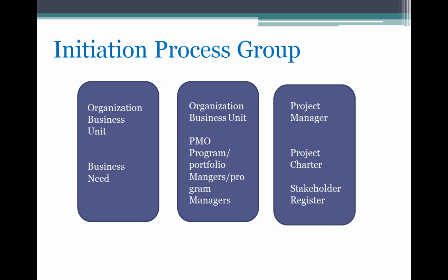They assign a project manager to prepare a project charter for this business case, and the project manager analyzes and goes through the various processes and prepares the project charter and the stakeholder register of key stakeholders in this project. So the project manager identifies the stakeholders, gets the requirements from all stakeholders, and prepares the project charter.